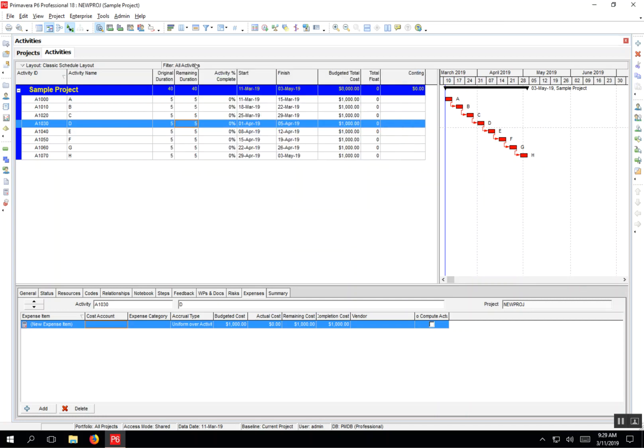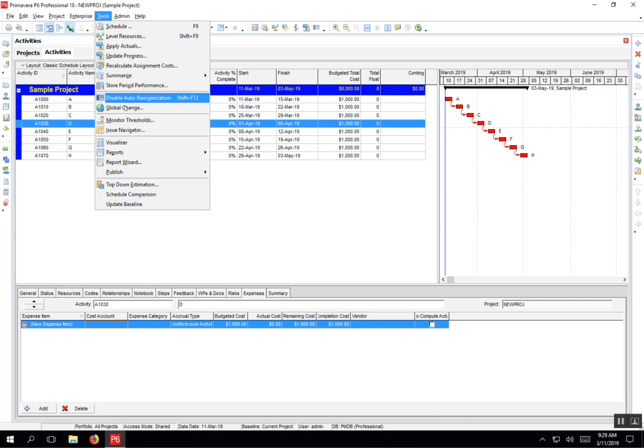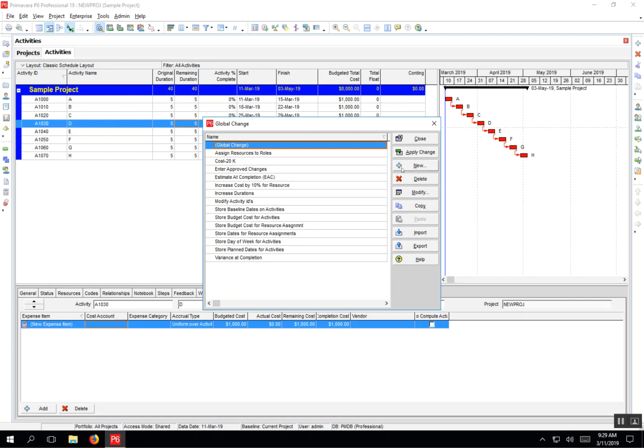I'm not worried about the spelling right now. So I'm going to run a quick global change, which is a formula calculation, and figure out the contingency which would be 10%. I want to multiply all of these budgeted total costs by 10%. I've got Tools, Global Change.